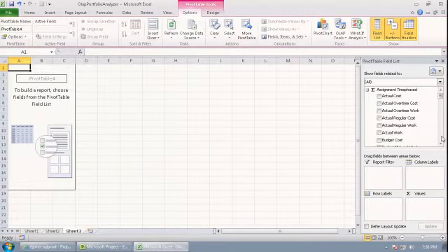Just as a little side note, that's not generally a piece of information that's included and available in your Project Server system. That's something, though, that your local friendly Project Server administrator can create for you. There's a field built in called capacity for each resource. There's a field built in for assigned work, but there's no remaining availability. But your Project Server administrator can create a custom field in the system with a formula behind it that just subtracts those two numbers to give you the remaining availability.